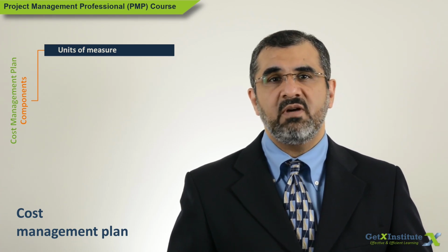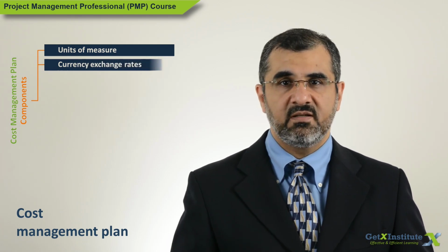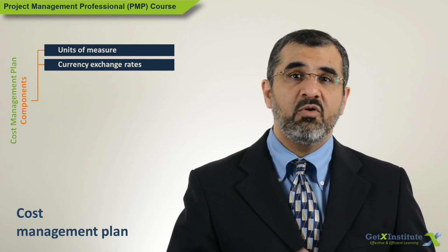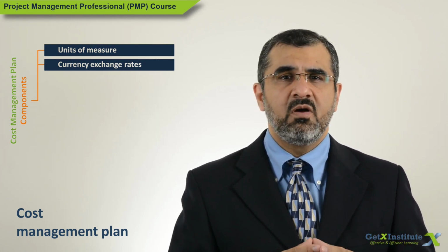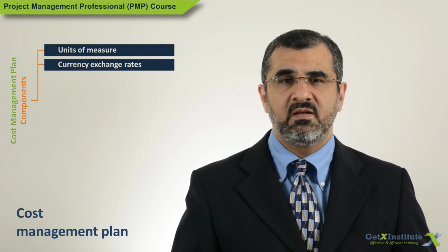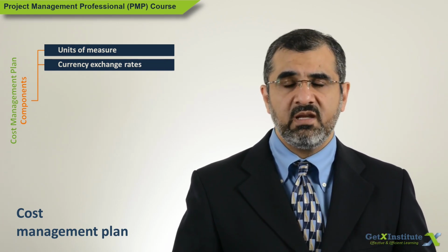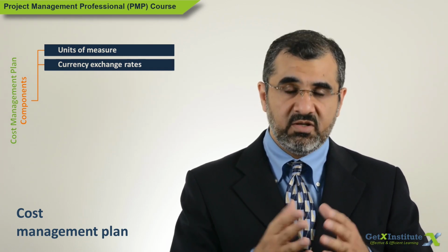This brings us to another factor, which is currency exchange rates. The ever-changing currency exchange rate can jump both ways for the project, favorable or unfavorable. So, how will the project manage the fluctuations? Will it be based on the daily exchange rate or monthly rate or the annual rate for all the exchanges that will happen during the year?